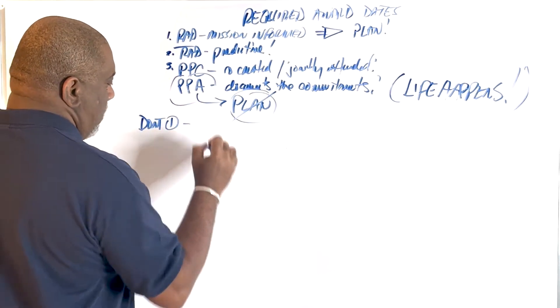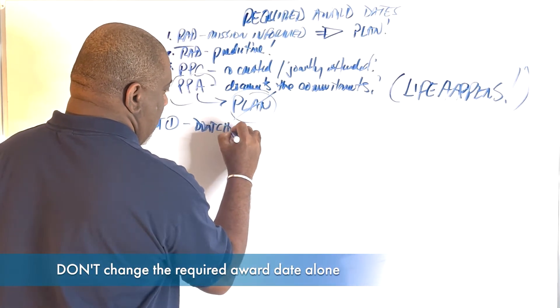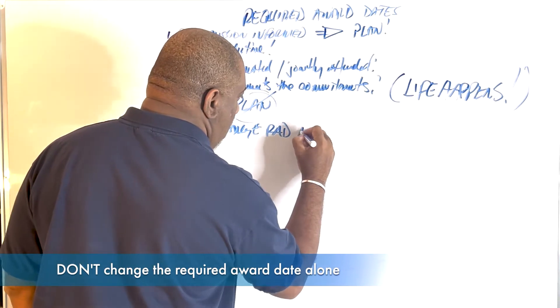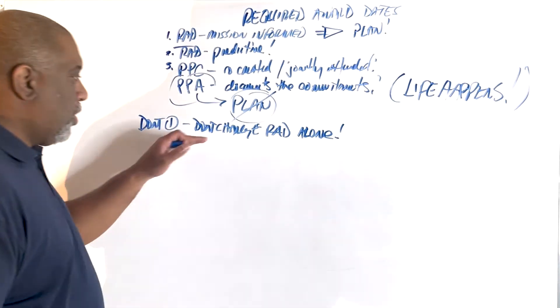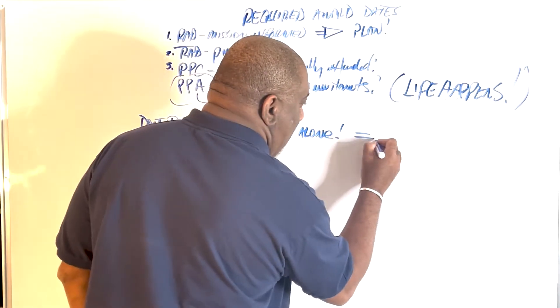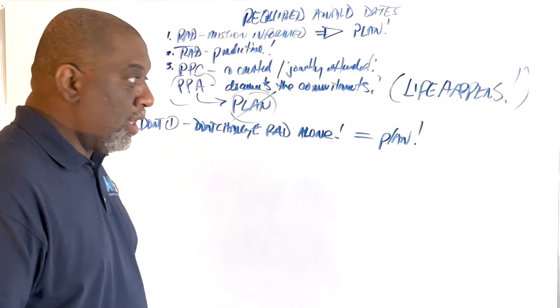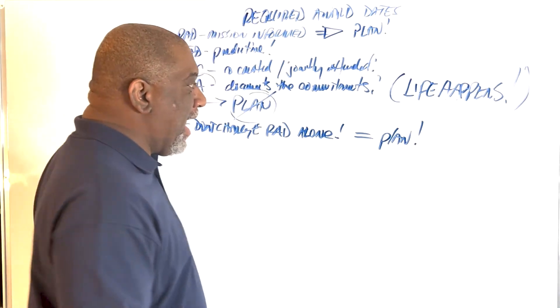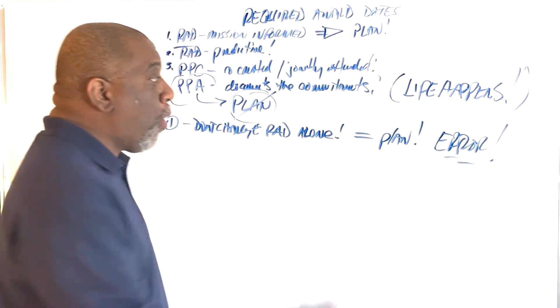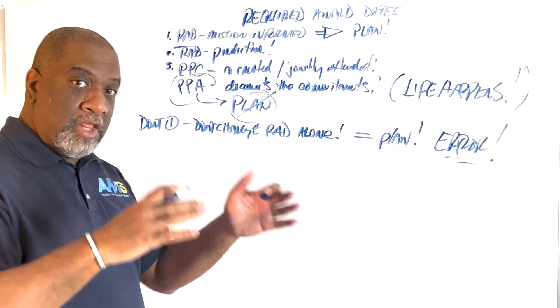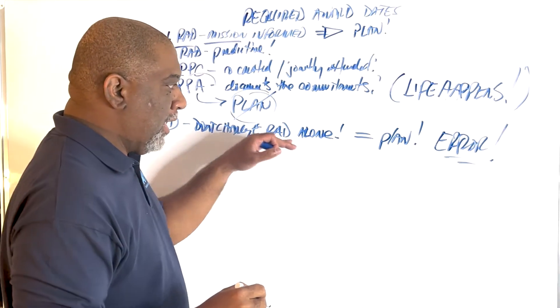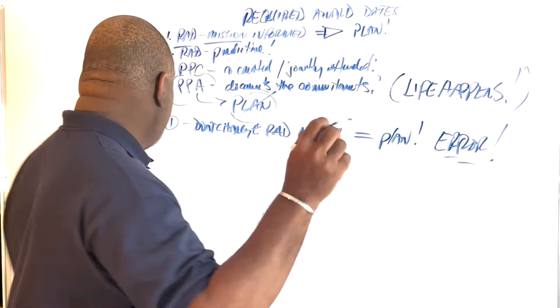Don't number one, don't change the required award date alone. Don't change that required award date without changing the plan, you get error. So it's like, something's wrong. And you wonder why your plan is still in the red or being highlighted. It's because the required award date, which is mission driven, is now not reflective of the plan.